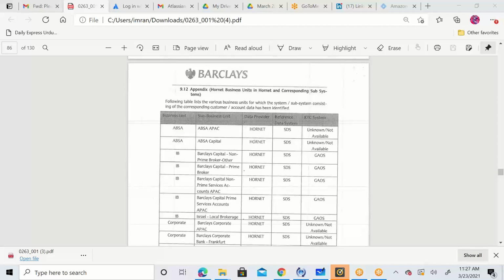This Barclays project was in a hybrid approach. What is a hybrid approach? It simply means having a BRD, having a complete FRD, getting sign-off approvals and all that, and then breaking down that FRD's functional requirements into a user story specification document. Instead of going for a 2-week sprint, we went for a 1-month sprint in Barclays. So we had user stories, we had FRD, we had BRD, and we were having a 1-month, 4-week sprint within which we were designing components. Sometimes you will see the hybrid approach followed by weak teams.